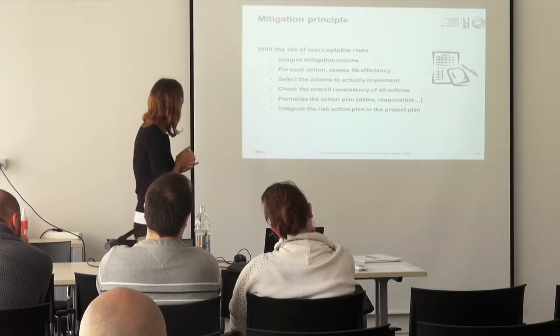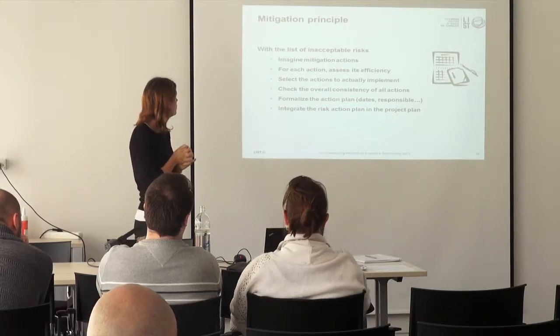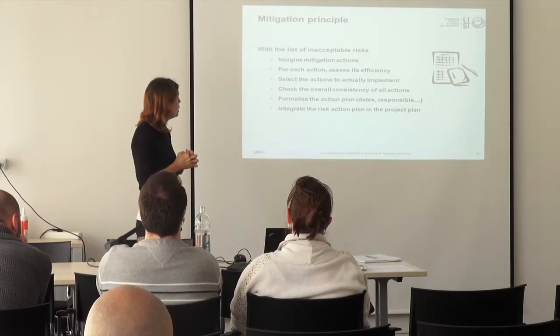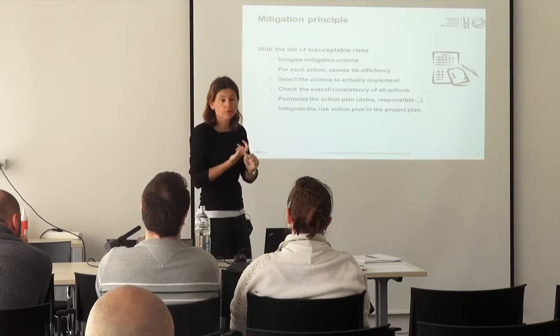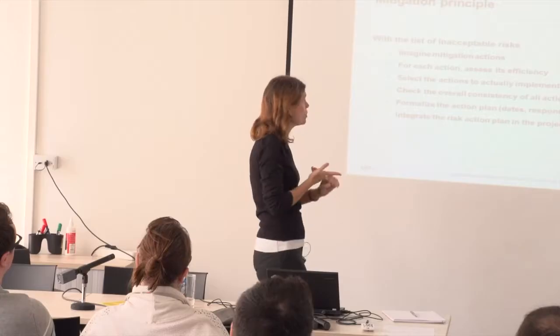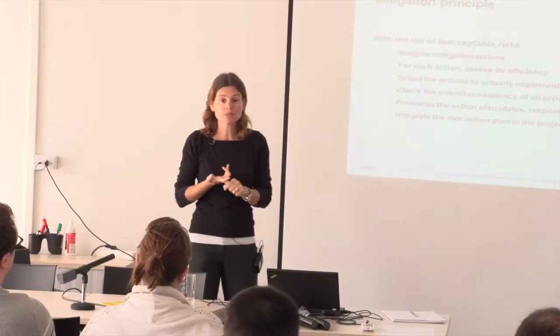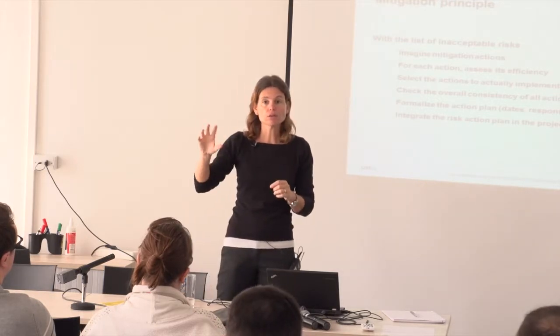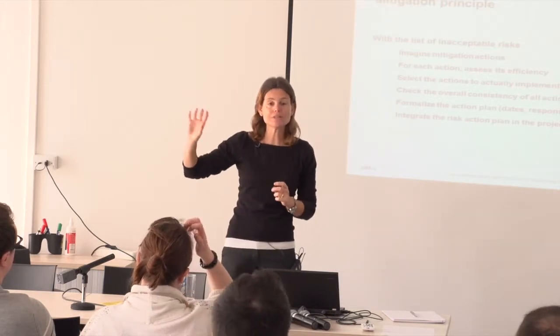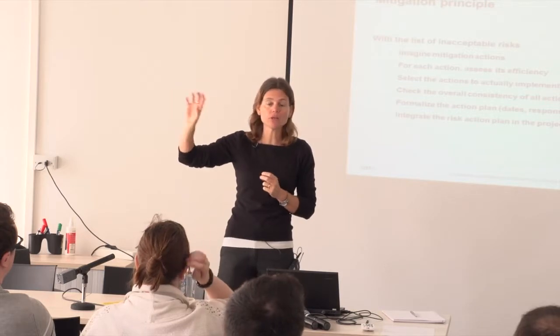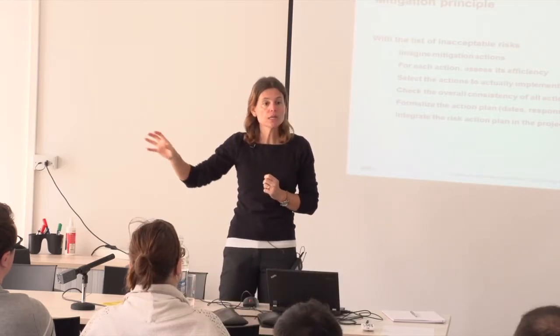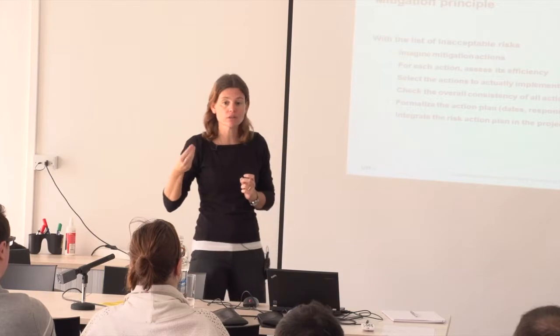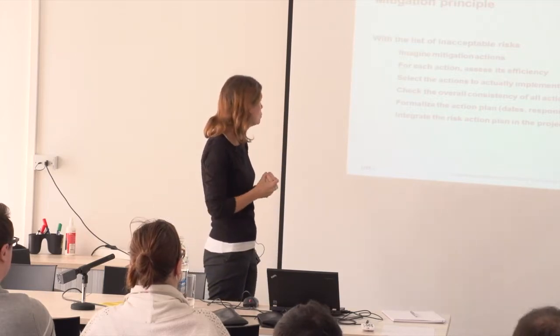So yeah, what are the principles of the mitigation phase? You try to identify the different mitigation actions. For each of them, you try to assess to which extent it is going to reduce the impact and the probability. So what will be the efficiency and the effectiveness of that action?